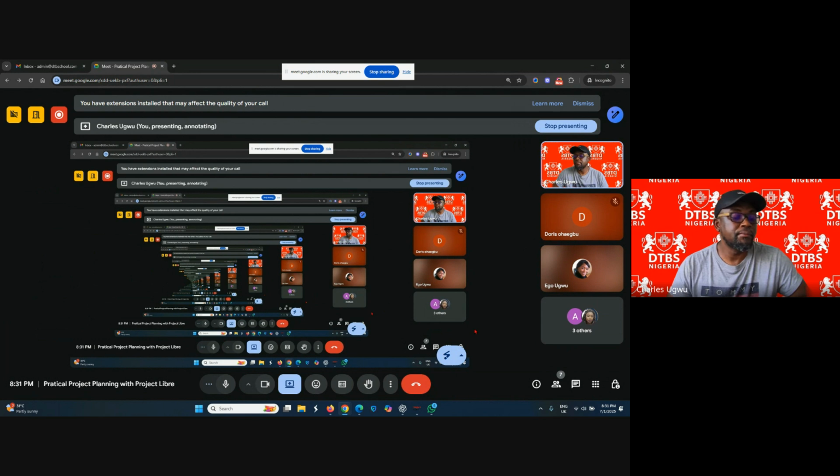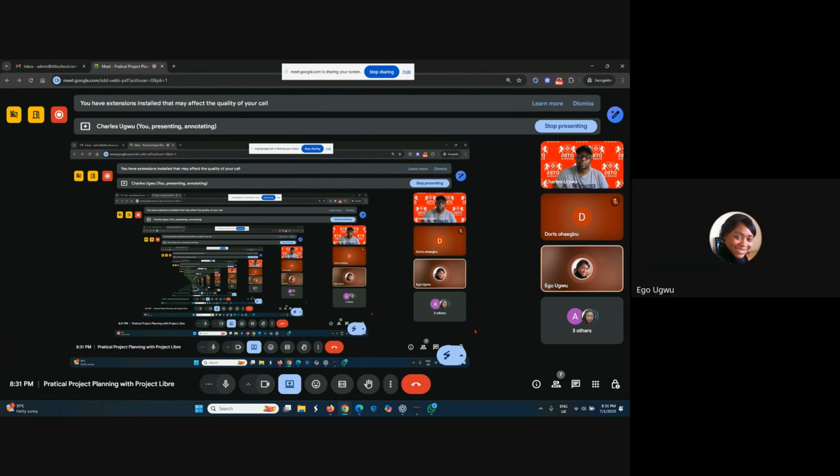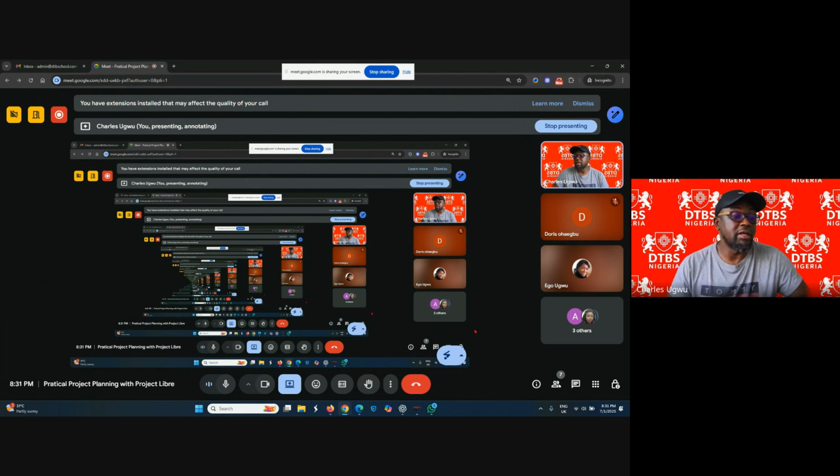Okay, so we could amend this start date. Yeah, you can make it reflect the actual start date. But you make sure everything that is already captured, it will be captured that the work is already done, till this date.